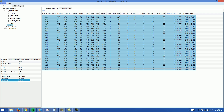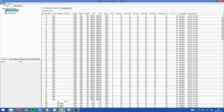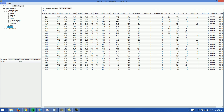Closing production time and looking at cost — these are the same walls, but now showing cost. The first column, total cost, is a summary of working cost and material cost. Working cost is set based on the time we saw in production time. Material cost is a summary of concrete cost, insulation, reinforcement, costing material, form, and opening costs. There is also a manual field here.